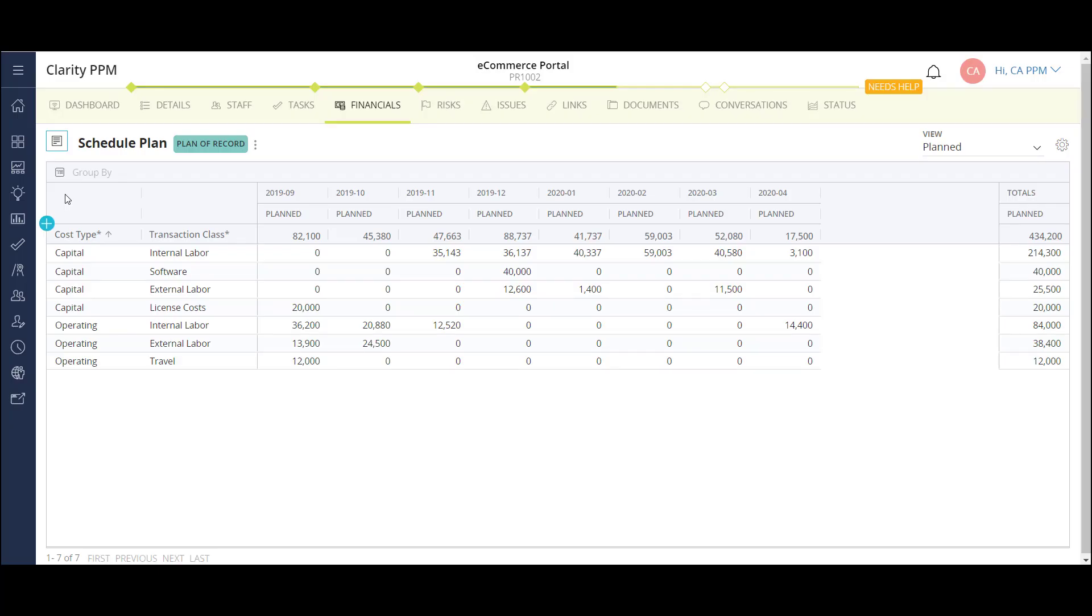Here, I'm looking at the details of my project cost forecast, or in Clarity terms, my cost plan. The cost plan breaks down project costs into detailed buckets. In this example, I have costs broken out between capital and operating, internal and external labor, and non-labor.